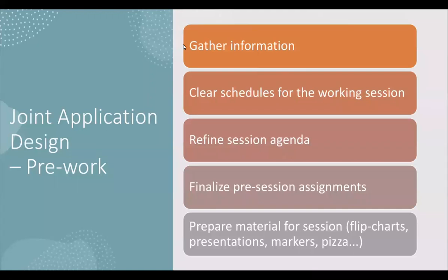Now, we did a pre-session. Now let's do pre-work. In the pre-work of any JAD session, you need to gather information. You need to clear a schedule for the working session, refine the session agenda, finalize the pre-session assignments, and of course, prepare material for the session, which could be some flip charts, a presentation, and even, if people are hungry, you may want to get some pizza.